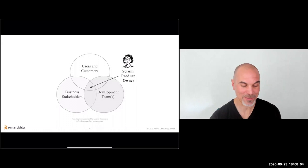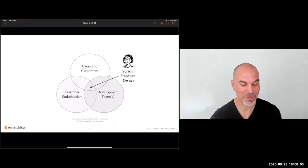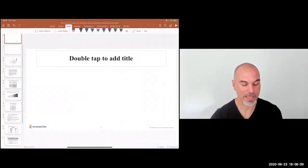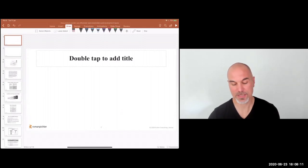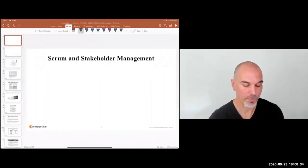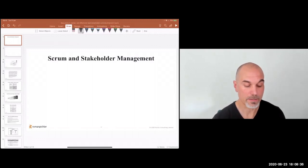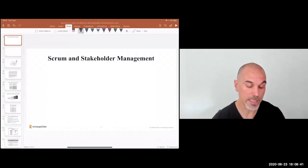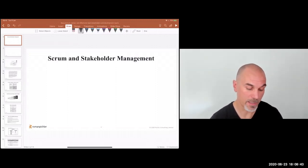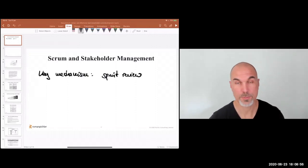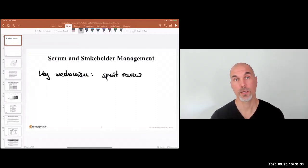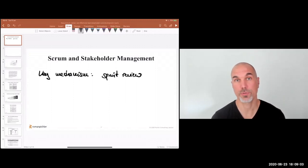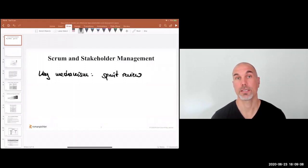That's my perspective, and to a certain extent, maybe theory. Now, how does Scrum help with managing stakeholders? There are a number of ways to use Scrum to engage and work with your stakeholders. The key mechanism for me is the sprint review meeting. The sprint review encourages us to inspect and adapt the product, look at the latest product increment, and gather feedback from users, customers, and internal stakeholders.